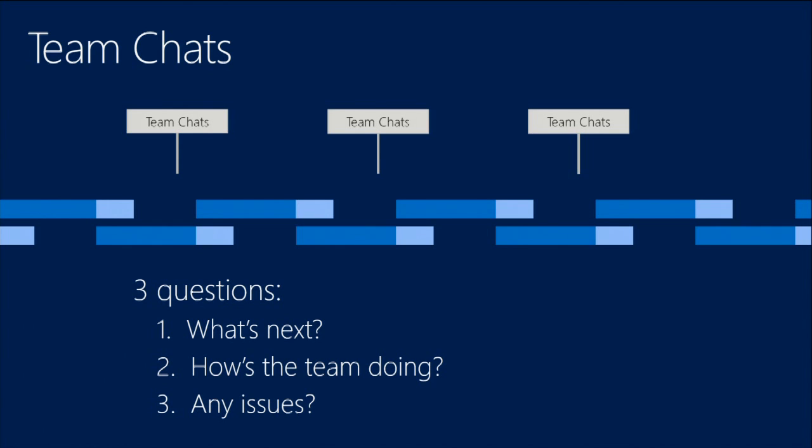So I'll tell you how this works. The stakeholders schedule a 4-hour meeting. Typically, it's 2 2-hour meetings. Every team gets 15 minutes. As a team member comes in, the teams come in, they present a slide deck with a very simple slide deck with the answers to these questions.